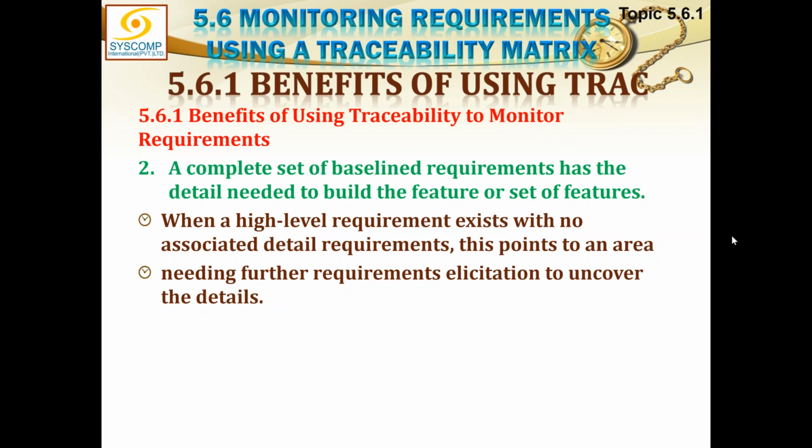When a high level requirement exists with no associated detailed requirement, this points to an area needing further requirement elicitation to uncover the details. That means that this requirement needs to be further divided into features and user stories because it is not descriptive by itself.